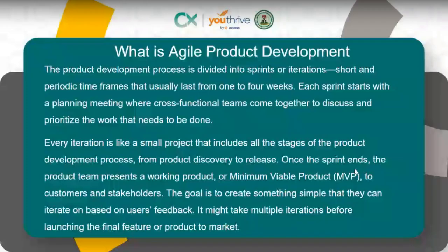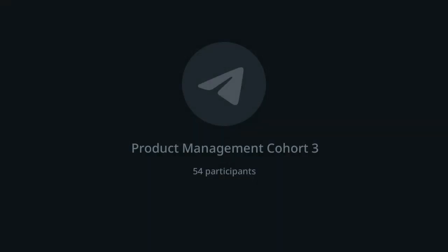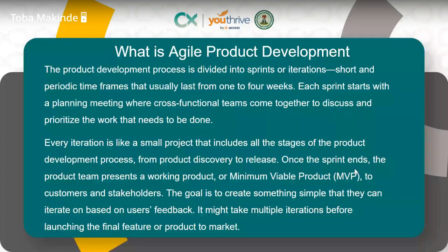Then all of the things that need to be done, the front end part, the back end part, all of that, is broken down for each member of the team to start working on, such that by the end of that sprint, by the time you've developed, tested, and reviewed, you should have a functioning search feature. Do you get? And that is working.